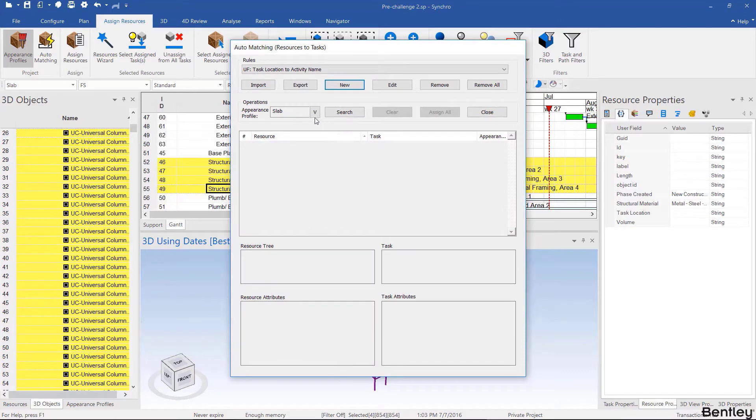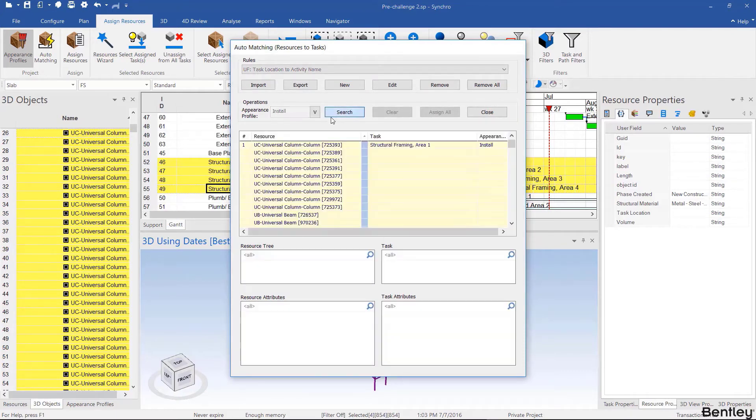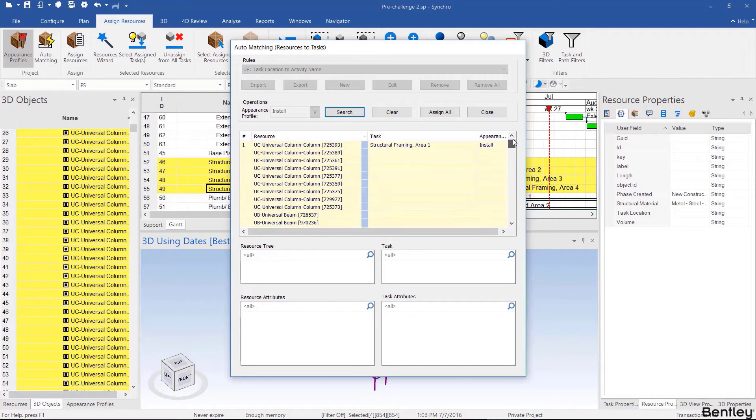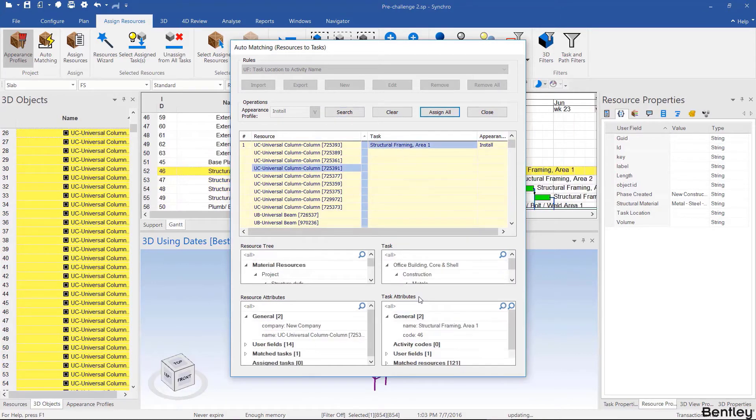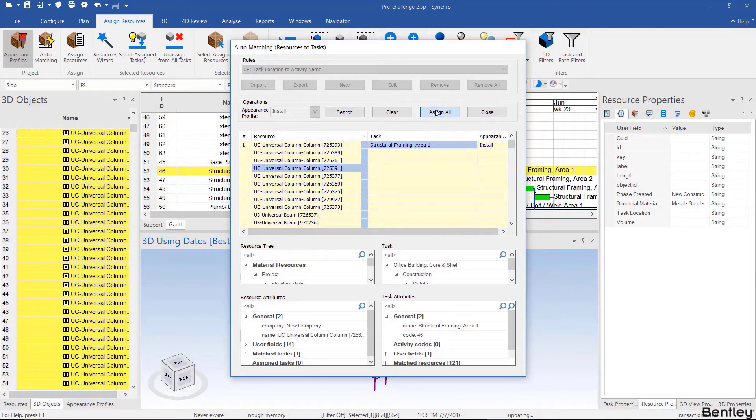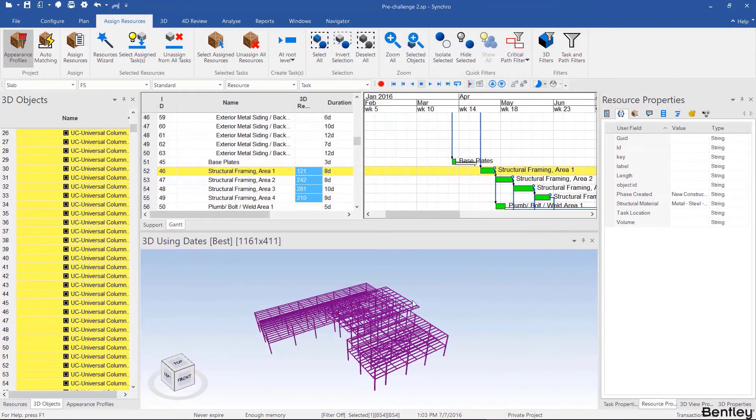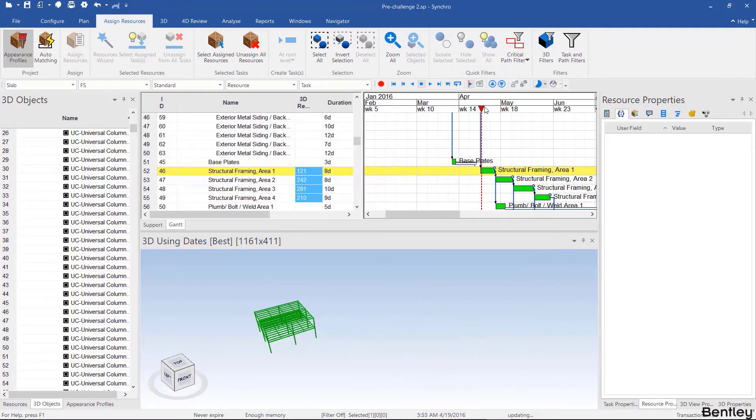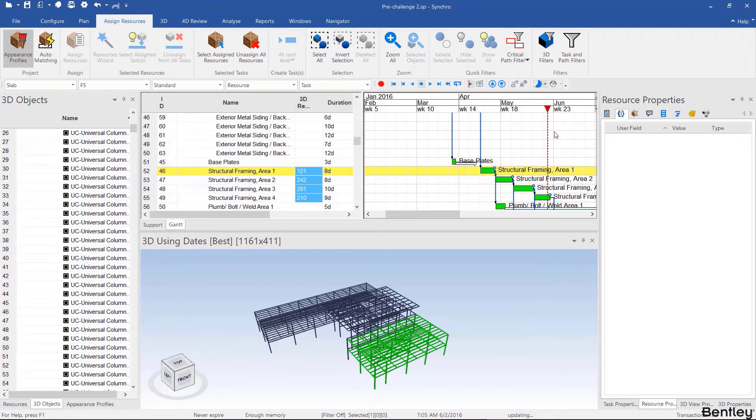Then we could choose the appearance profile and hit search. We can investigate what's been auto matched here. Every time it changes color it's a different group and you can click and see the parameters here. However, what I like to do is to assign all and then visually double check that everything's correct by simply dragging the focus time. This looks good.